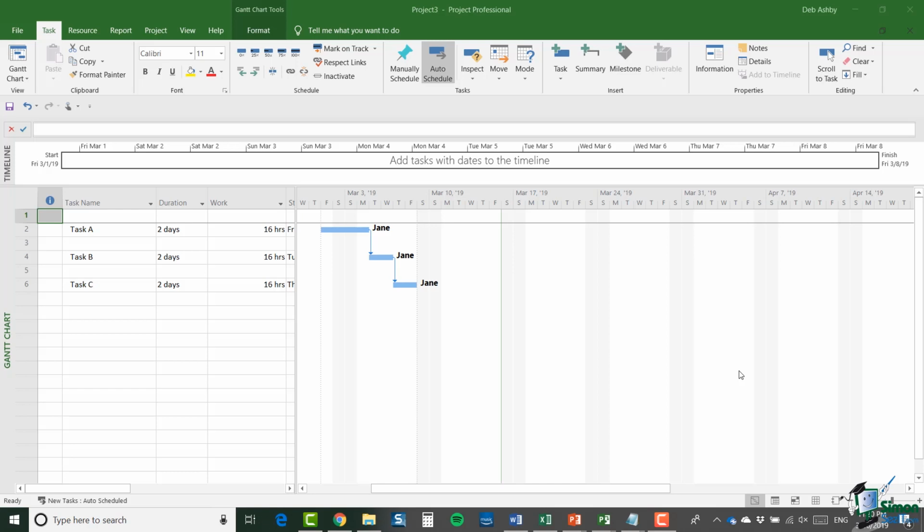Now let's suppose that I provide Jane with a little bit of help. So I say to Jane, "Hey Jane, John is going to help you with these tasks." If I assign John to Task A, what do you think would happen? You may look at it and say, well, obviously Jane is going to be able to get the job done in half the time. So instead of being a 2-day task, it's going to be a 1-day task. And obviously that is one option. But there are a couple of other options as well.